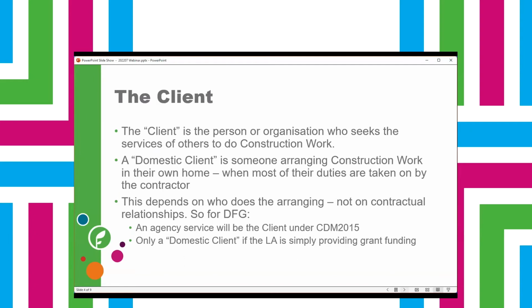The person who lives there isn't the client, because you're doing the arranging of the work. Even if the contractual relationship is between the person who lives there and the contractor, you're doing the arranging as the agent, so you take on the client responsibilities.